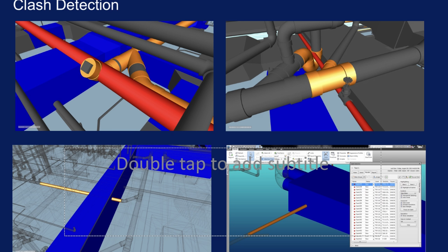You have this dialog box, for example, where the computer will compute all of the clashes in the project. So if you update the model with the changes from the engineers after they input their solution to the problems, BIM will compute whether there will be another clash, or whether those recommendations will solve the problem. So you don't need to visually check each part. BIM has this tool to check for you right away if there will be clashes. BIM can produce that accurate report.